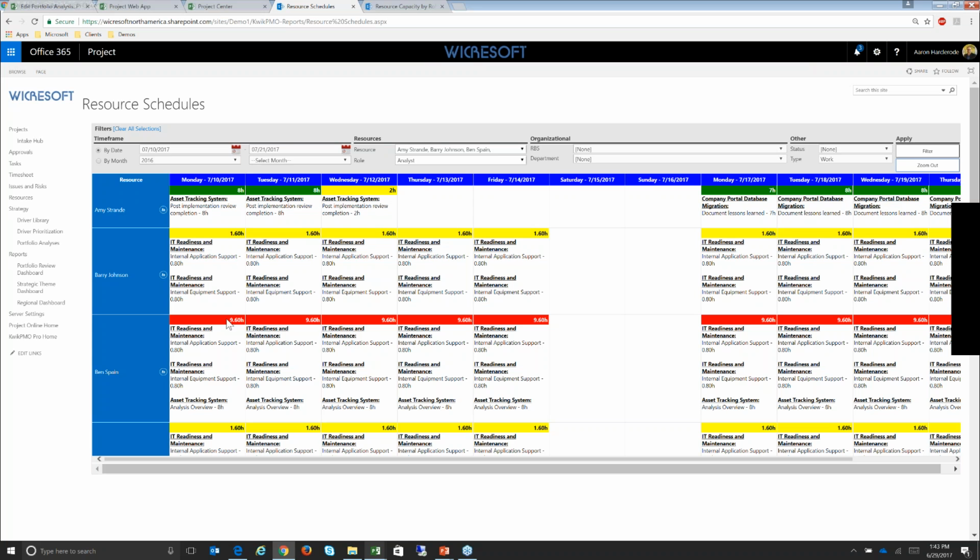Now, it's not horrible. It's only 9.6 hours a day as opposed to an 8-hour day. But if he's only expected to do about 4 hours a day of project work, then he's more than double allocated on that. So again, I can take a look at the projects he's on, and if I need to get in touch with the PMs to get the work balanced and leveled, get other resources on the project, or perhaps get the work spread out over a longer period, I'm able to assess that by looking at this here.